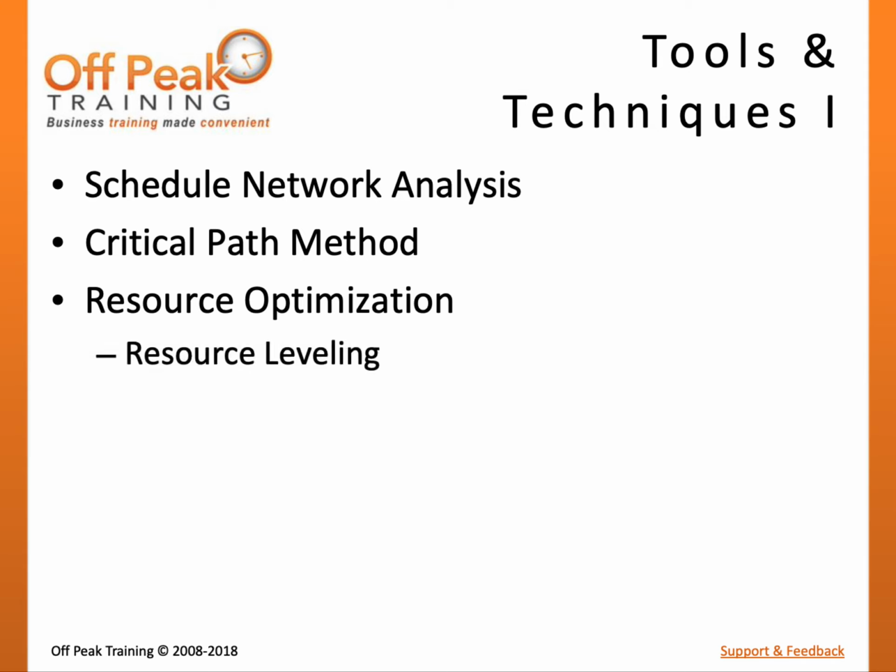Resource optimization is used to adjust the schedule based on resource management. Resource leveling is the rescheduling of activities to resolve the over-allocation of a shared resource or other scenario of resource limitation. This commonly delays the project completion. Resource smoothing is the rescheduling of resource assignments to provide a more balanced allocation without changing start dates for critical activities.